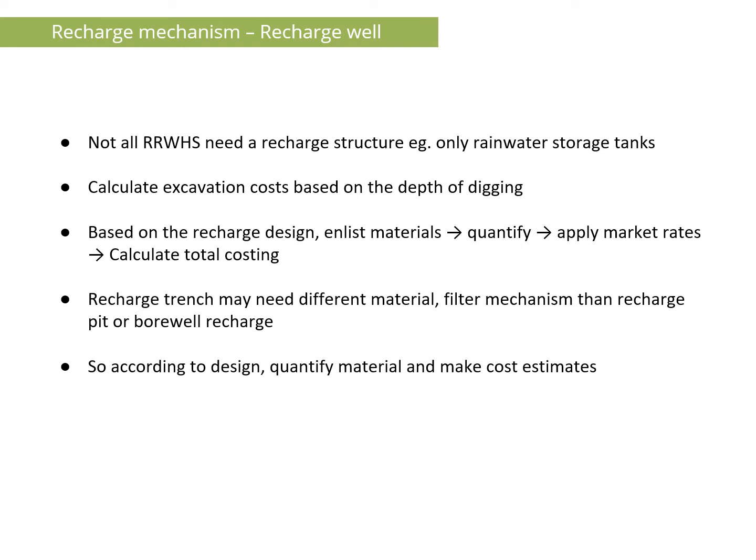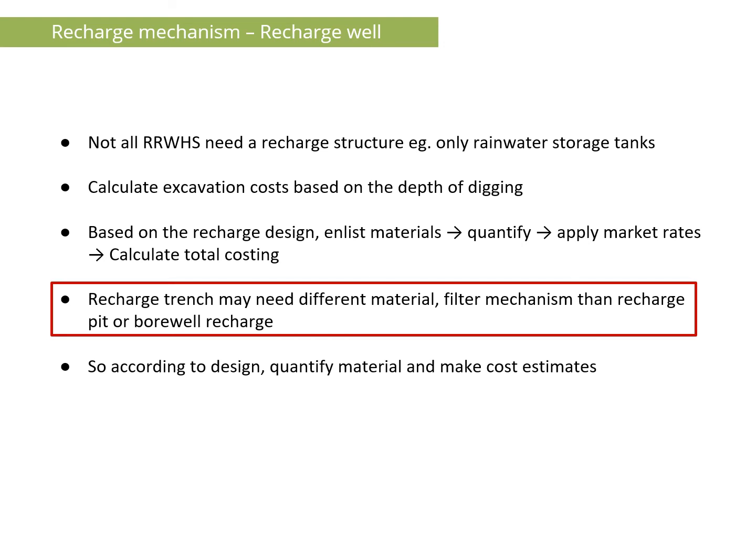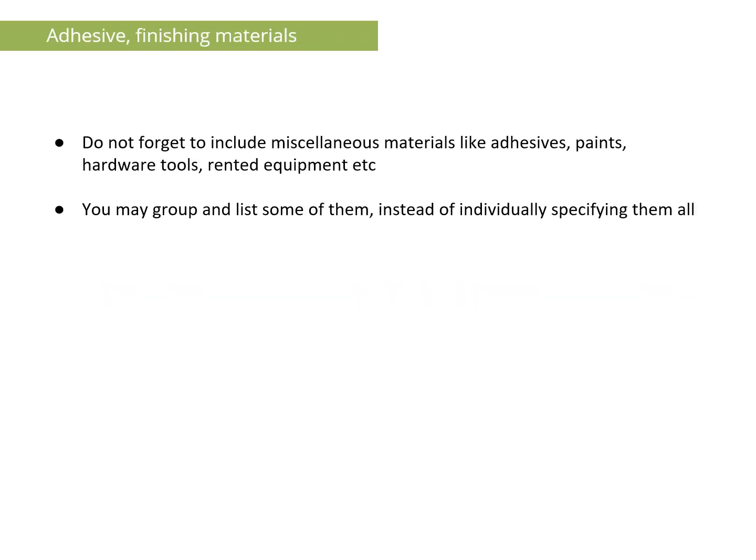For the recharge well construction, you need different materials like concrete rings, different filters like on-site constructed filter or prefabricated filter with filter media, or recharge bead or borewell recharge. Also, do not forget to include miscellaneous material like adhesive, paints, hardware tools, rented equipment, etc. You may group all these items instead of individually specifying them in the budget.